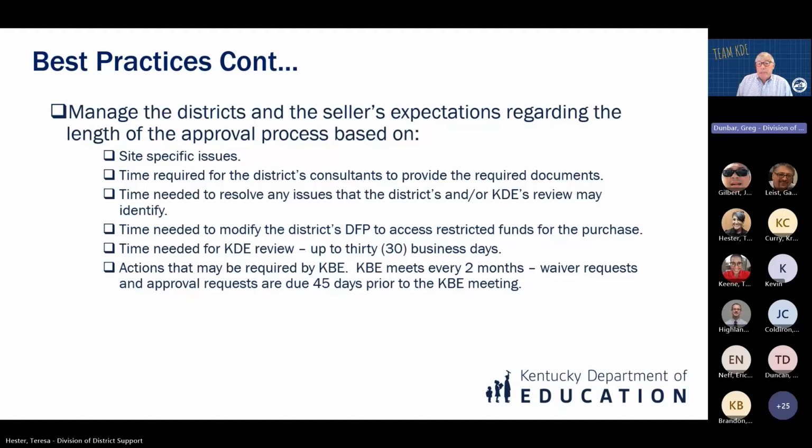The district's and sellers' expectations regarding the length of the approval process should be managed based on the specific issues that the site itself presents, the time required for the district's consultants to provide the required documents, the time needed to resolve any issues that you at the district level or KDE review might need to resolve, and any actions that might be needed to modify the district facility plan if restricted funds are needed for the purchase and the property is not related to a need identified on the district facility plan.